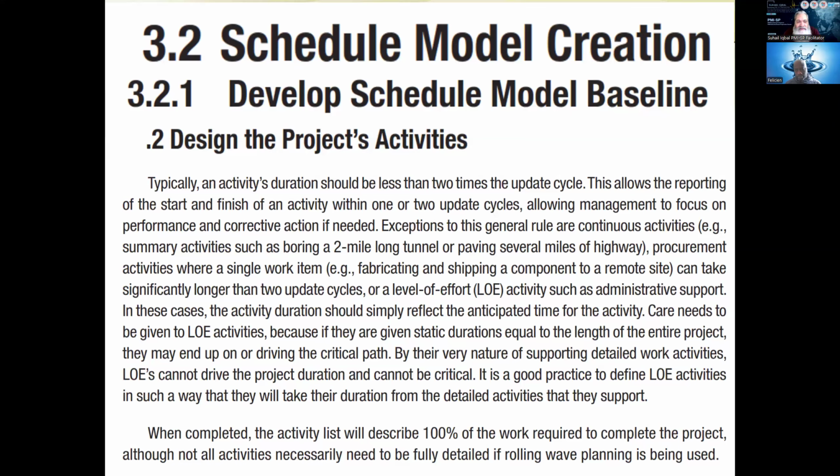Care needs to be given to LOE activities because if they are given static duration equal to the length of the entire project, they may end up driving the critical path. Now, this is interesting because the longest path in the project is the critical path. Agreed? Yes, sir. And LOE effort is also throughout the project.